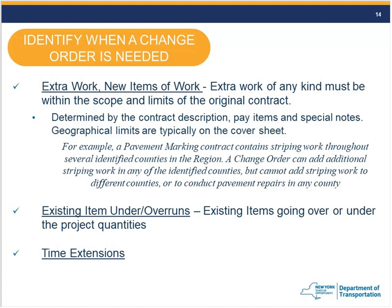For existing item overruns and underruns, sometimes you know in advance — for instance, a pavement job consistently running heavy on yield, or concrete repair areas much larger than estimated. Other times, overruns creep up unexpectedly. Time extensions are also relatively easy to identify: know your contract completion date and communicate early about whether a time extension is needed.